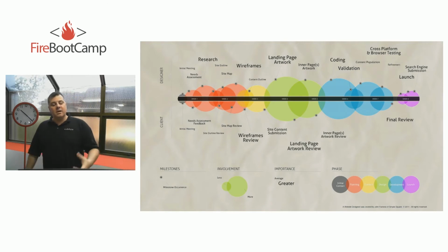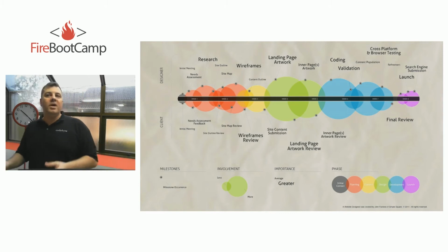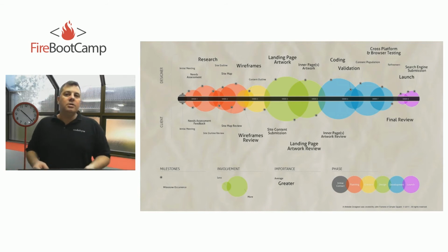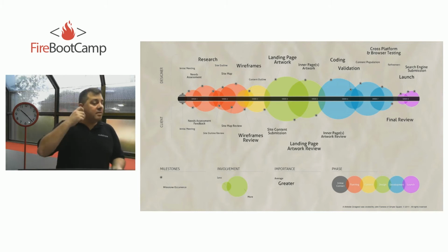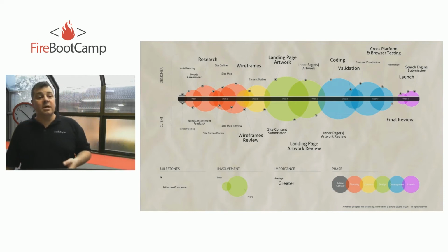So this is the MEP that I wanted to talk about, and this is the project negotiation, so to speak. So when more features are loaded onto you, you need to negotiate. You can do really 2 things, logically. One of them is you either negotiate a longer delivery time, because you say, look, we can do this, and if this is higher priority, yeah, that's fine, but guess what? Everything comes at a price, right? So this has to take precedence over something. So basically, maybe the product owner needs to do prioritization every time he loads up new PBIs to you.